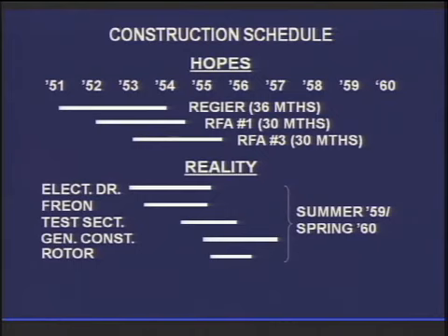There's more than just getting these contracts in lockstep. It had some problems, too. Like there was a strike at the Westinghouse plant. One of Pittsburgh-Des Moines' subcontractors went bankrupt. Plus, some of the work turned out to be a lot more difficult than anticipated, but it wasn't going to cost any more, fellas. It was going to cost that limit.